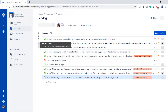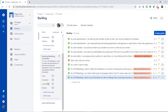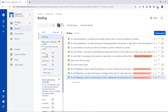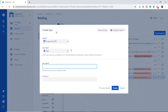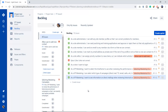The second way is you can create the epic from the backlog. You can see we have two options in the vertical menu: one is Versions and the second one is Epic. Just click here and you will be able to see the list of epics already created. You can create epics from this bar by clicking the link which says 'Create Epic'. Once you click on it, it gives you a window where you can write the epic name, the summary of the epic, and press the Create button.